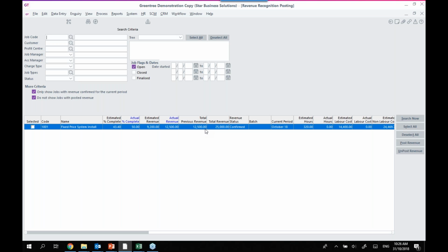And quite often you might have someone in the finance department saying, yep, we're ready to start this process, select all the jobs that use revenue recognition, and let's hit calculate. And then each of the project managers might then go through that previous step we just went through, which is more of a review, to go through each of their projects. And once they've confirmed, it may go back to a finance role to do the end step, which is posting these transactions.